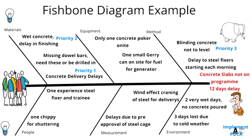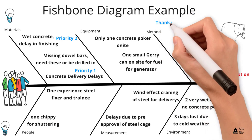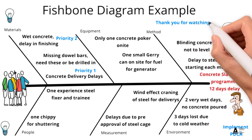That's a very short example of a fishbone diagram and how it can be designed to get to the root cause of potential problems. Normally there'll be a lot of issues causing a delay — in this example, a 12-day delay in concrete slabs, where five slabs a week were planned. There's a whole range of reasons for the delays, but we're trying to get to the root cause, overcome that, build on it, and improve. Hope you got something out of it — thank you very much.